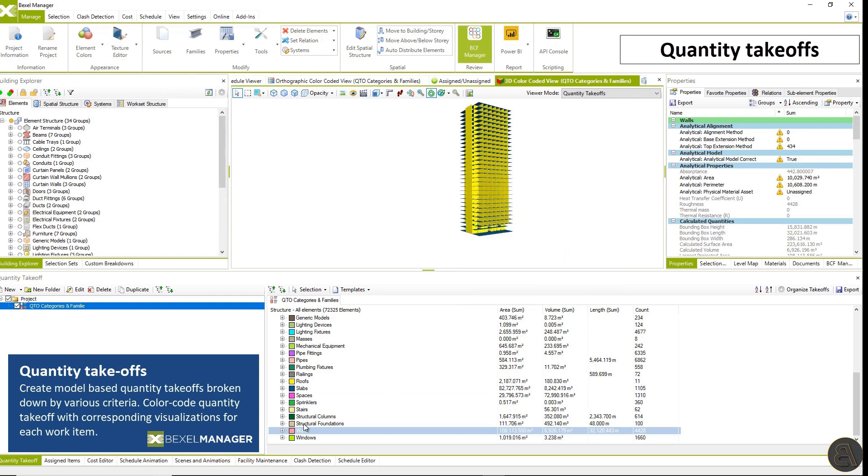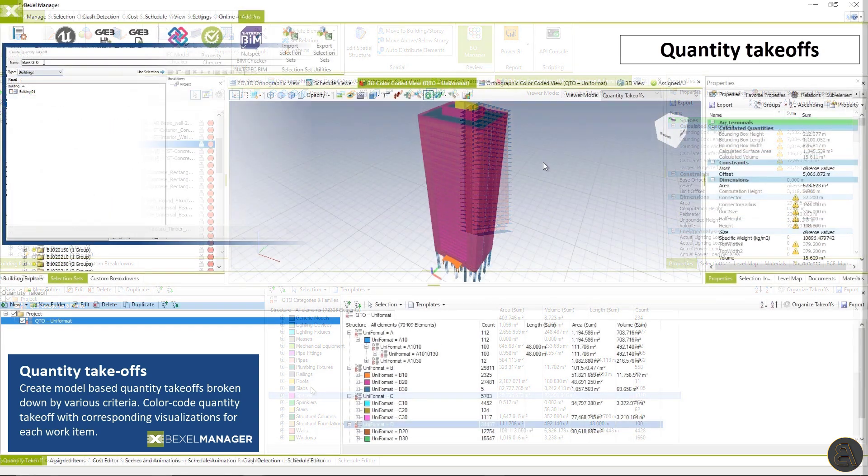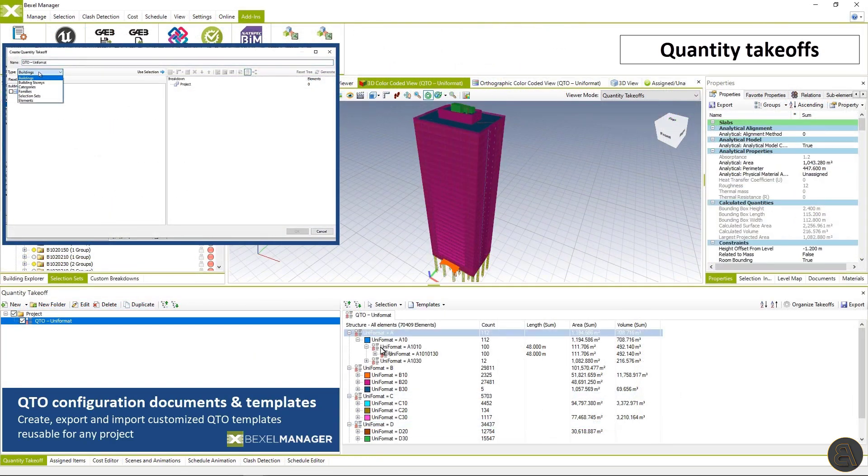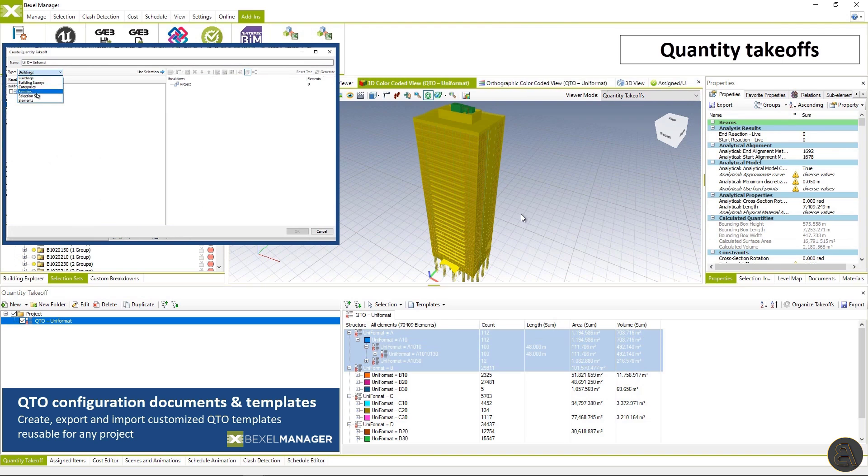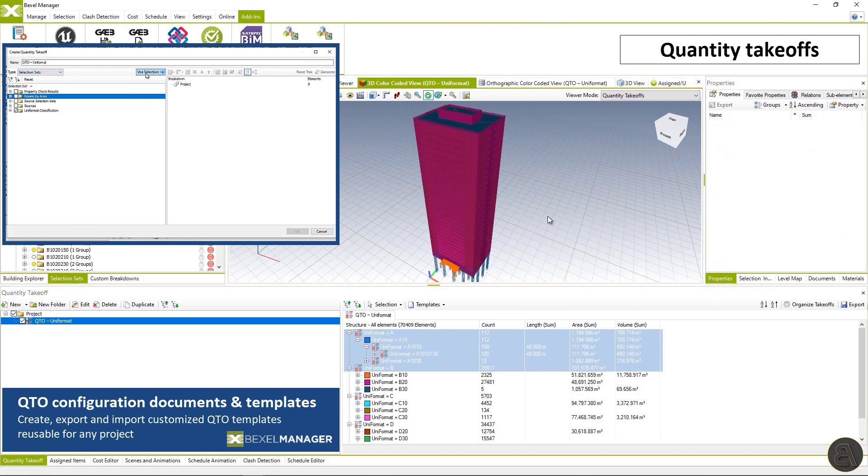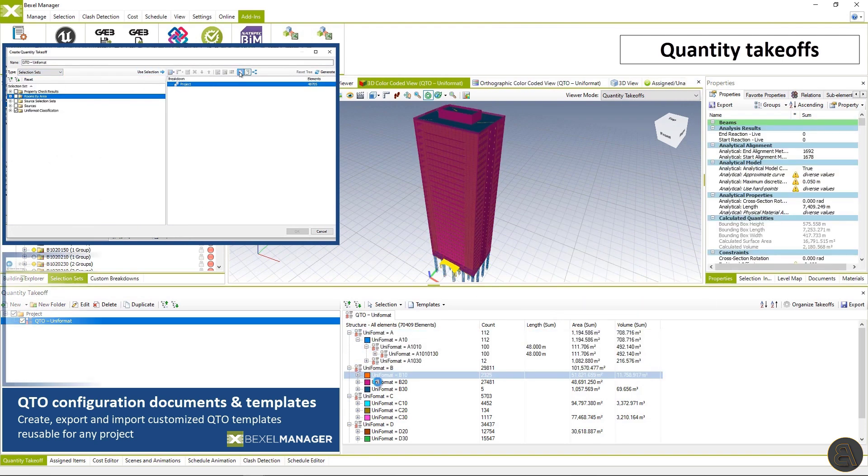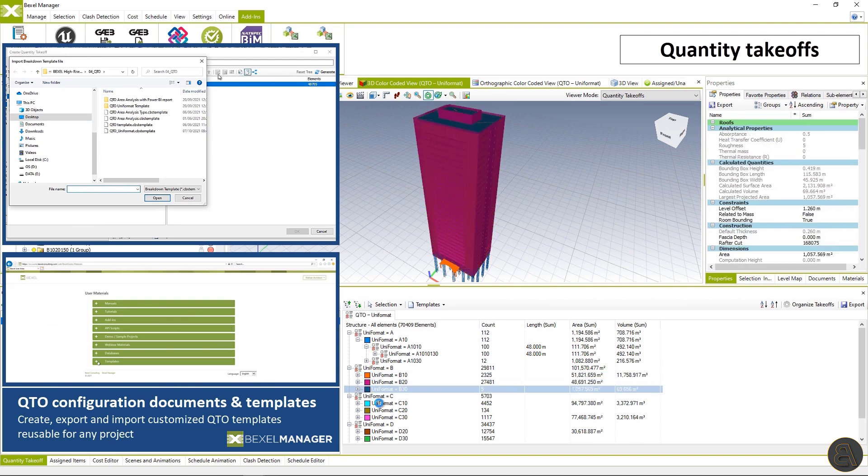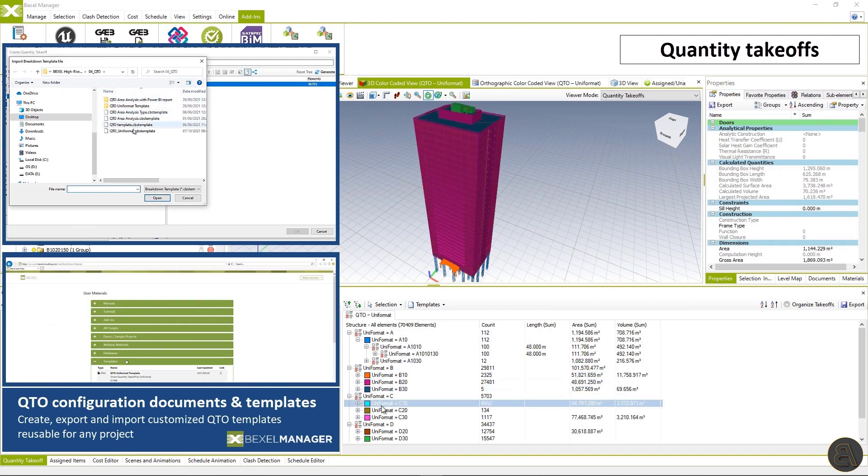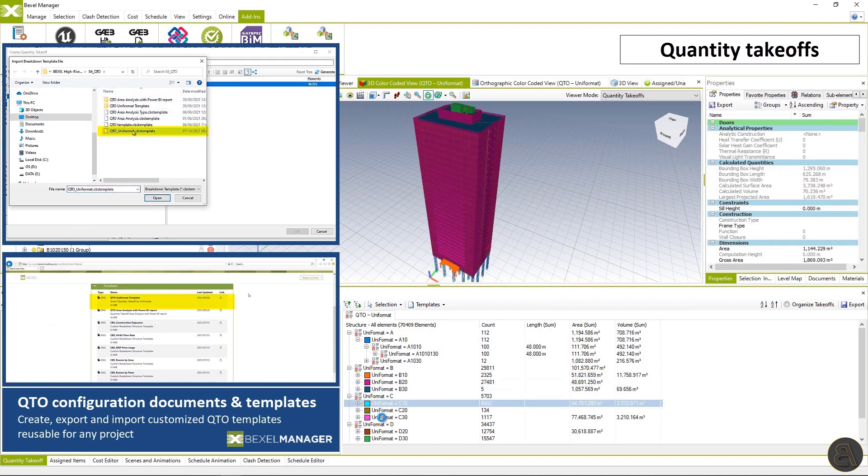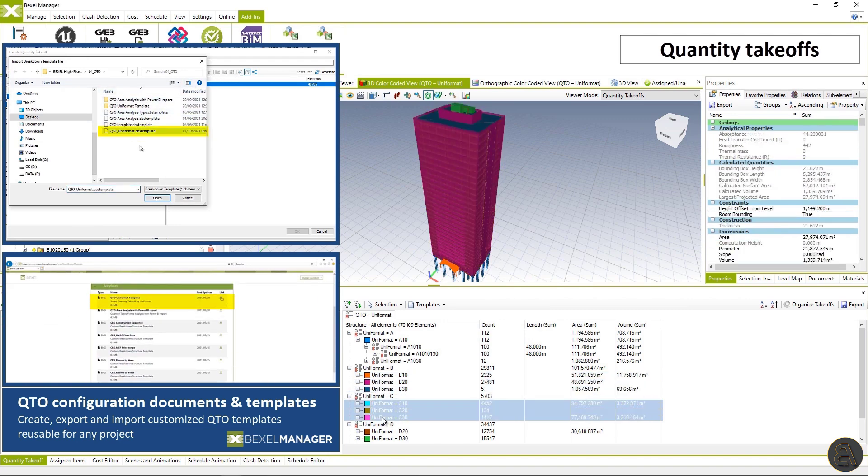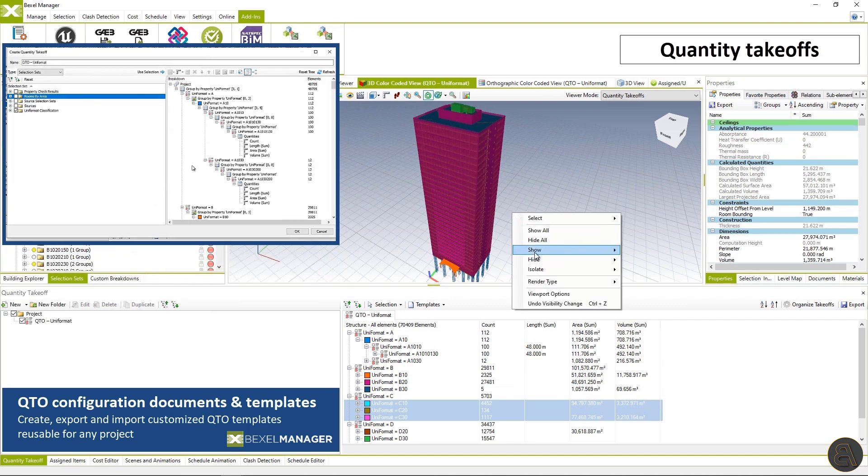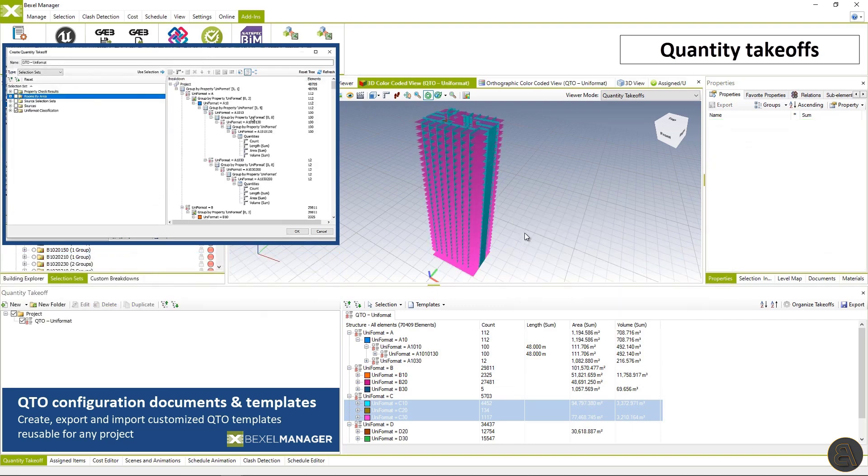Work items within QTO could be visualized interactively selected and color coded. Once created quantity takeoffs could be saved as a template and reused on other projects. Also, you are able to use and adjust QTO templates from Bexel knowledge base or use CBS templates in the quantity takeoff module or vice versa.